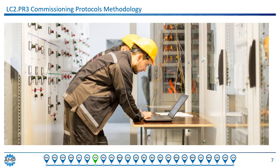The third process is commissioning protocols. Commissioning is performed after installation and site acceptance testing. It verifies that specified equipment is installed, is functional, and is ready for validation. Many commissioning installation qualification inspections are contained in the site acceptance testing, which verifies correct equipment is installed correctly and is acceptable for commissioning. This is called integration, and it means there's no need to do things twice. For this reason, FAT, SAT, and commissioning processes need to be well-defined with specific handoffs between the events before any of them are conducted to prevent overlap. Commissioning checklists can be used for smaller and simpler projects, considering items like correct items installed and correctly identified or labeled, item is documented in the CMMS as appropriate, and the asset is functional, including process parameters checked and calibrated.